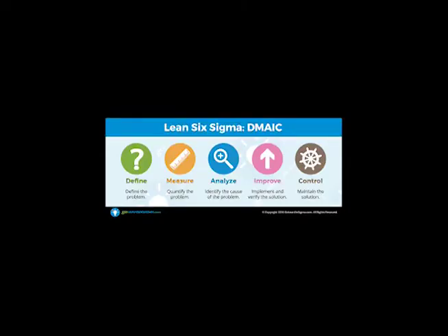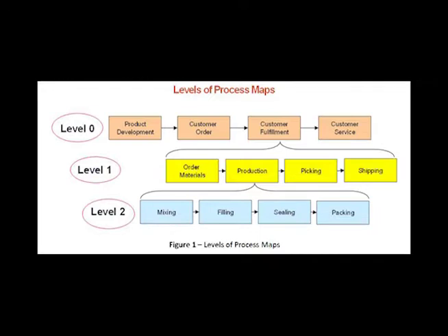Six Sigma uses the DMAIC methodology to improve existing projects. DMAIC stands for Define, Measure, Analyze, Improve, and Control. Define. The problem must be defined using a problem statement. The problem should have both a high impact and be a problem that is possible to solve with the resources available. This step also requires defining the goal to fix the problem and defining the process needed to reach the goal by creating a process map.